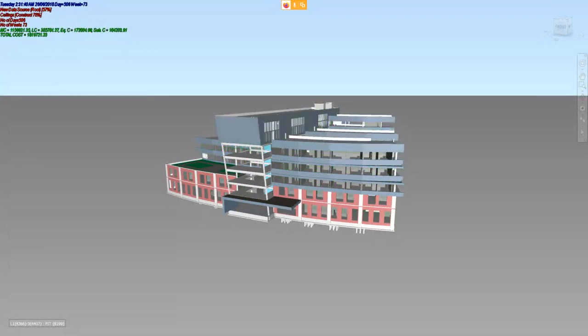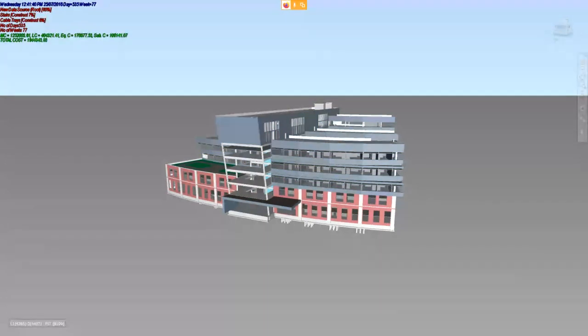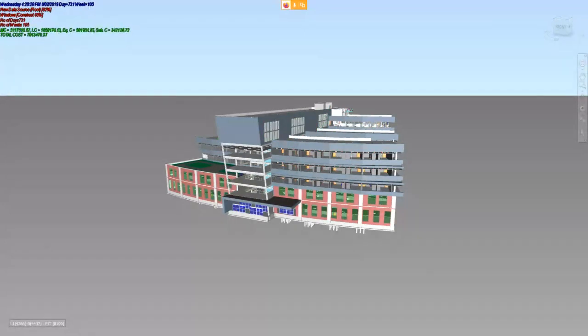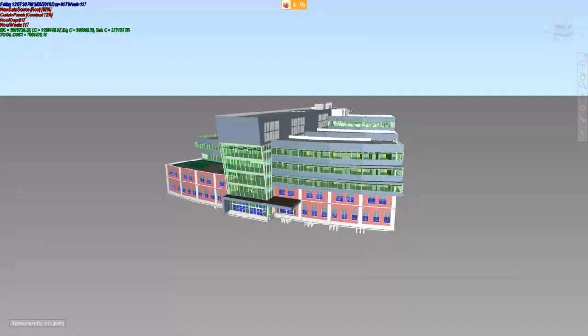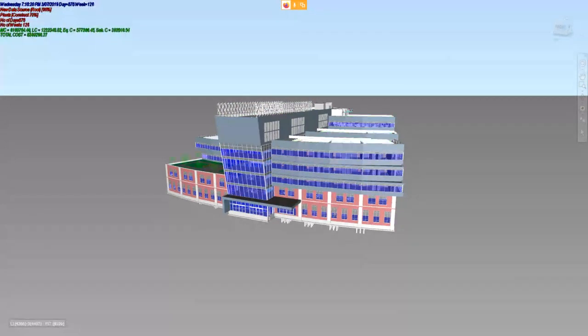All the interior walls were fine. But you'll start seeing some other tasks that are delayed. For example, the inside elements. So it gives you a very clear visual feedback of all the tasks that are delayed and all the tasks that are fine. And as I said, for better understanding, you can also look at these tasks here to see what are the delayed tasks, or you could go through that calendar and one by one click on the next step to get slower visual feedback rather than playing it in a simulation.